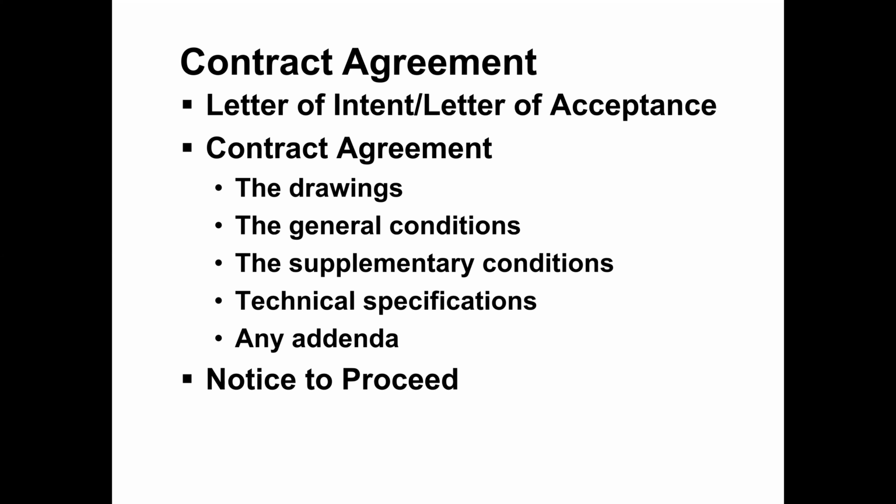You can establish the site office or any workshop, like we discussed in site layout planning. They can mobilize their workforce and equipment, and then start the construction. So the notice to proceed will mention the start time of the contract, the start time of the project.